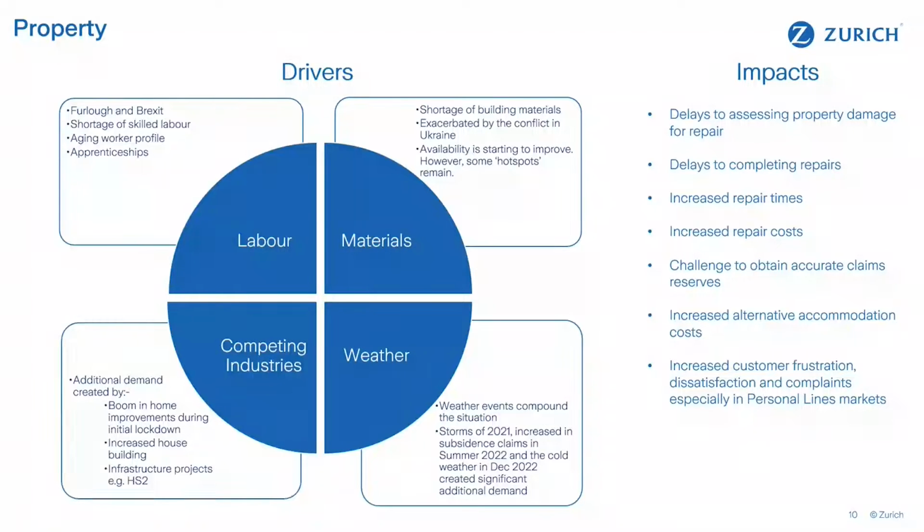In terms of overall prices, the Building Cost Information Service estimated that general building cost inflation was about 13% last year, but the inflationary picture is looking a little better for this year. Some commentators are forecasting building cost inflation for this year of about 5 to 6%, but others believe it will be more like between 2.5% and 3%. Thereafter, between 2024 and 2027, building cost inflation is expected to be around 2.5% per year. But as you can probably imagine, there is a high degree of uncertainty in relation to those particular estimates.